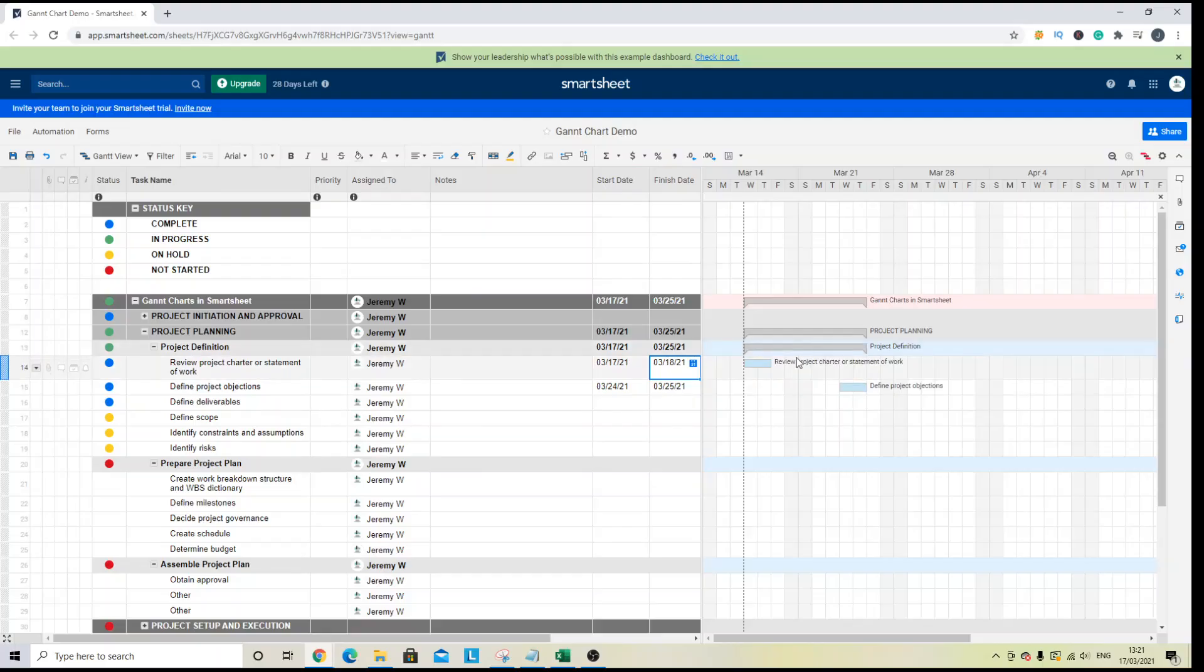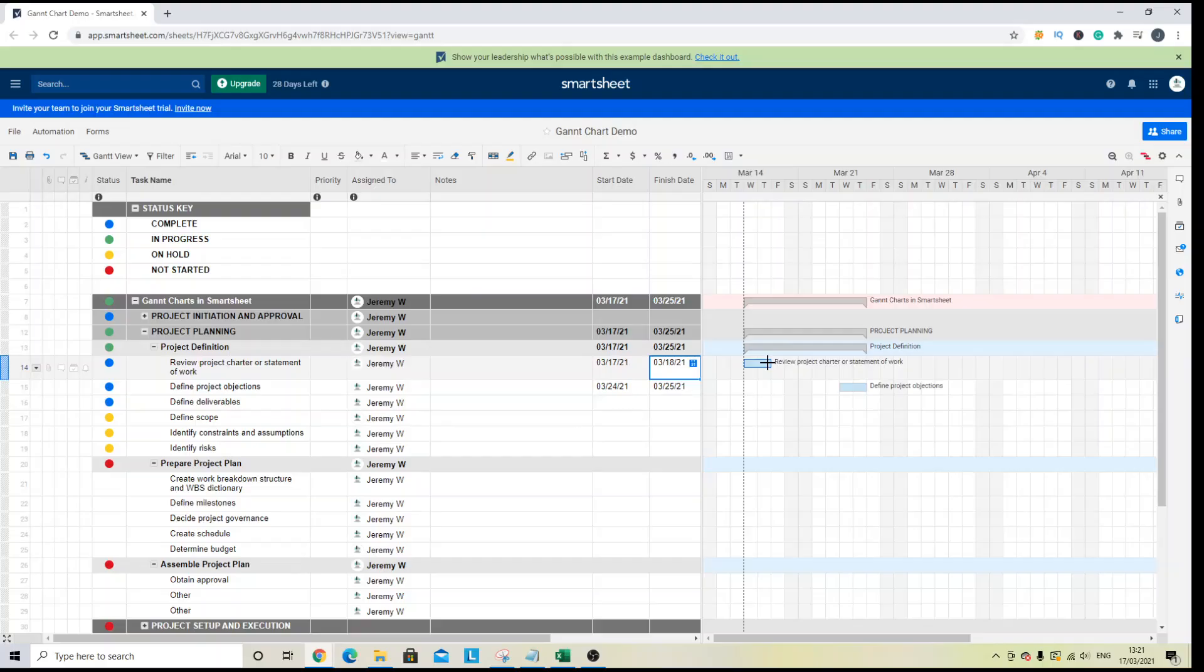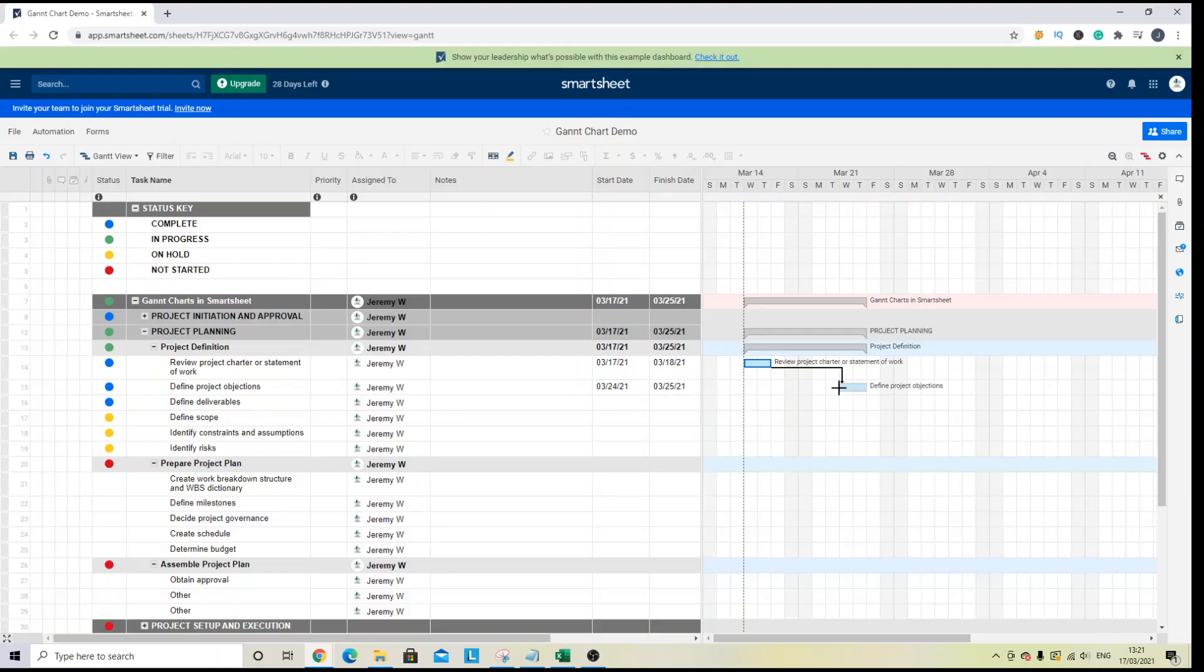And the next thing to quickly discuss here and another key benefit of the tool is that you can create dependencies between the different tasks. And to do so, you just need to look for this icon here. So when you hover over, you're looking for that icon. Hold left, left click and you want to drag to the start of the next task.